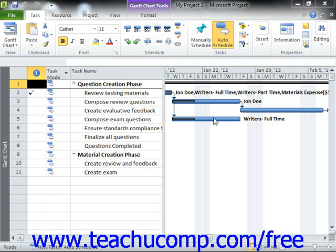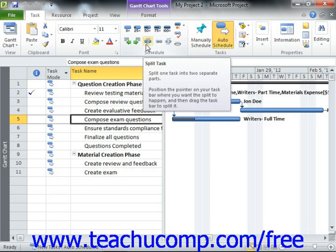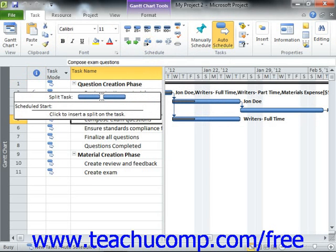In order to split a task, select the task in the Gantt chart view within the project file. Then click the Split Task button that appears in the Schedule button group on the Task tab within the ribbon. At this point, your mouse pointer icon changes to the Split Task icon.